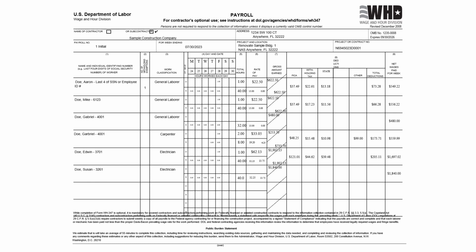You would have to list the name and location of the project as indicated on your subcontract documents. Where it says project or contract number, you would have to include the prime contract number. Please don't use the Upside Management subcontract number. Block 4 indicates the days and dates of the pay period. This should match the week ending directly above.